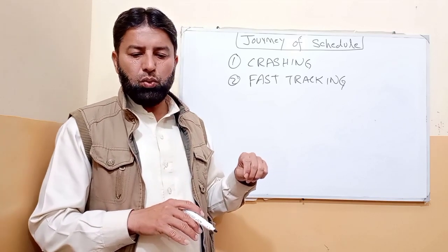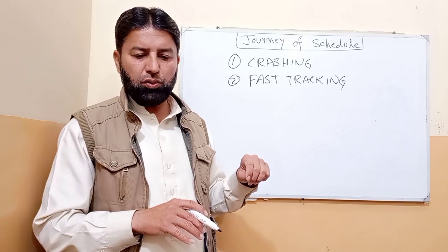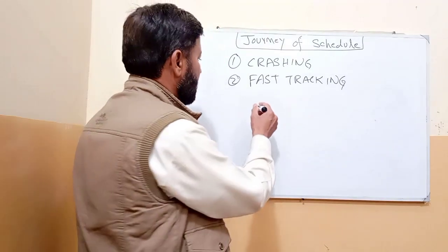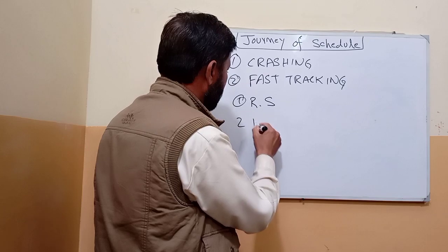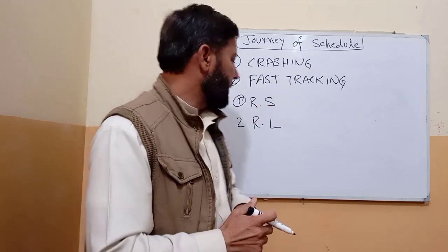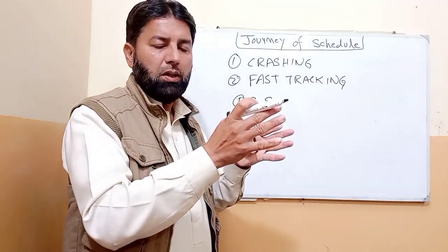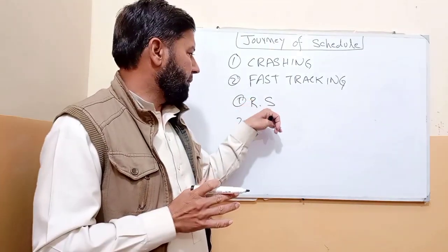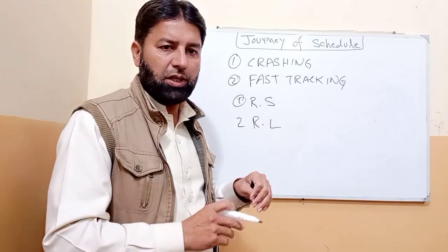Then there is resource optimization technique. There are two types: resource smoothing and resource leveling. In resource smoothing, the schedule is fixed. We are not going to increase the schedule. We will maintain the resources in between.